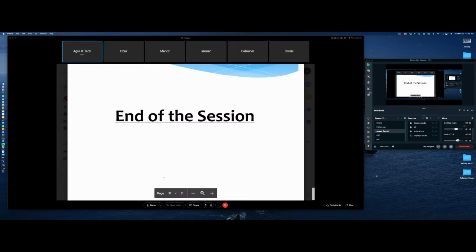Sir, I have a question. Yes, go ahead. If at some stage a user wants to add some more functions, and we've made all the flow charts, how do we accommodate those things? If the process changes, you have to go and change the process flow diagram, buddy. No, you would take the one and update it. First of all, if there is a change in the process, that has to come as a change request, right?